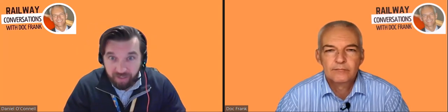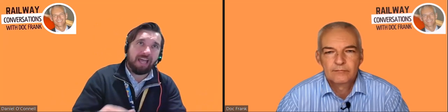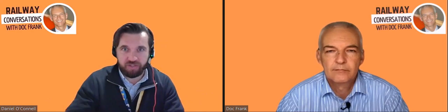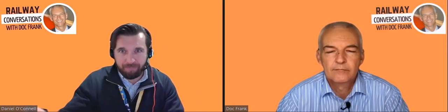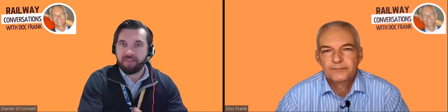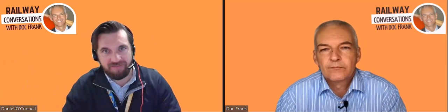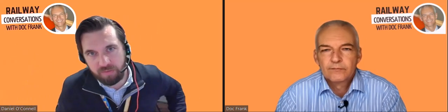Is that a safety critical event, or is that failure relevant to someone not knowing how to perform the test, or is it a functionality issue as well? So I think the building blocks that you put around TNC facilitate that or allow you to prioritize the tests that you need to do, but also manage people's expectations. You've clearly identified that these, say, 30 scenarios are critical for the delivery. The amount of time you're able to do that, you've done these, and the back end of that is that subsequently you have these 970 tests that need to be performed elsewhere as well. So